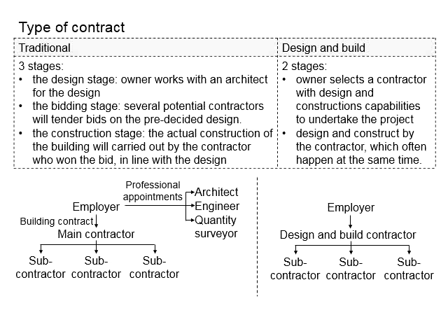The contractor will look into the details, do some pre-planning for the project, and quote a price, submitting it to the employer to bid for the project. Then the employer will select a contractor deemed to be competent with an acceptable price and award the project to the selected contractor.